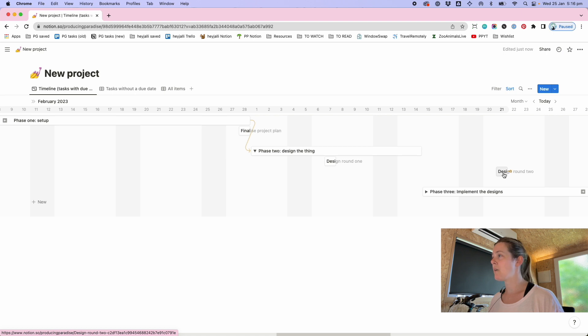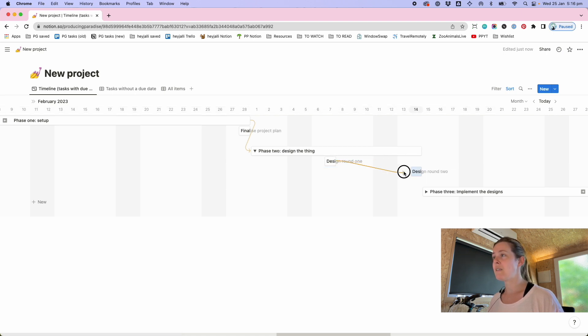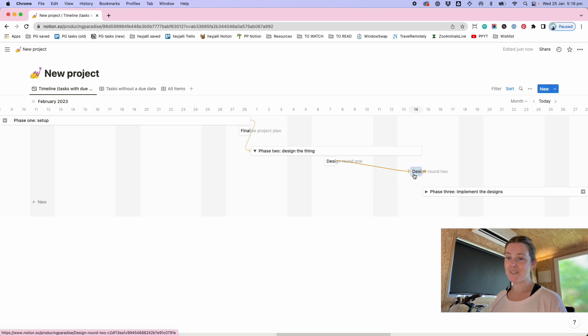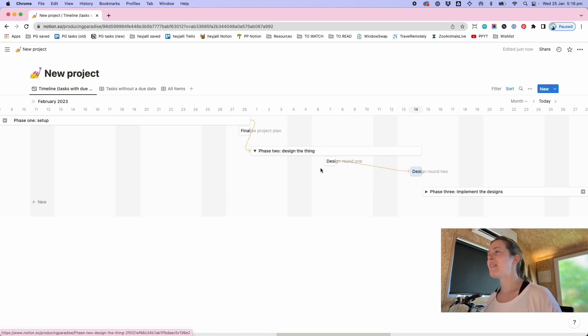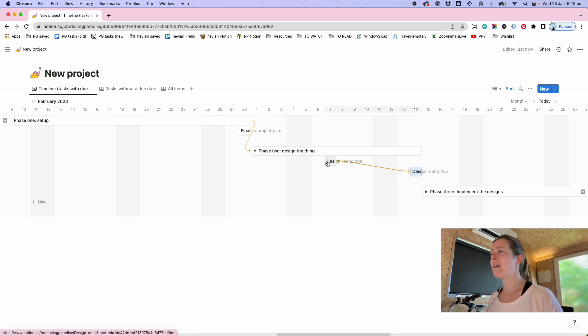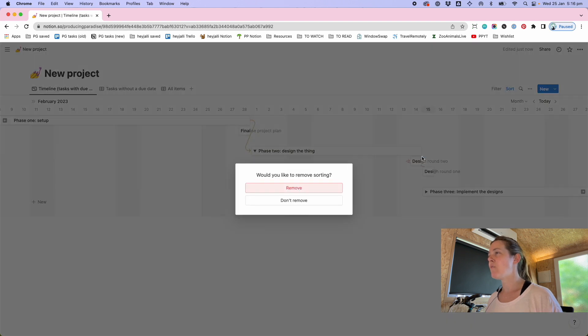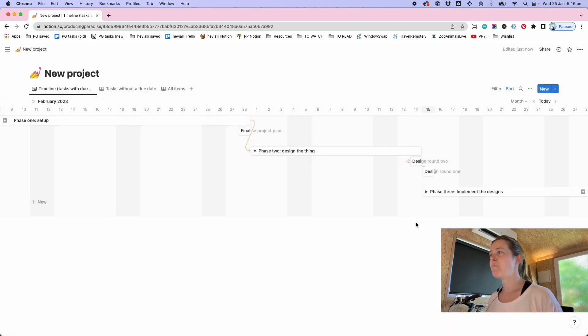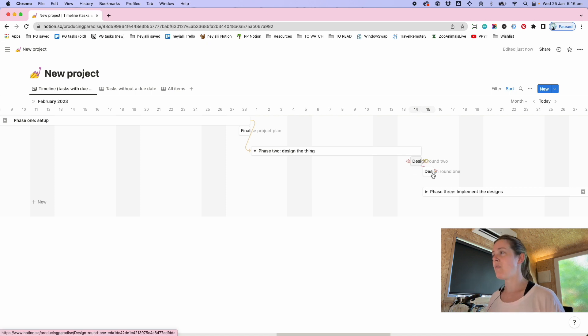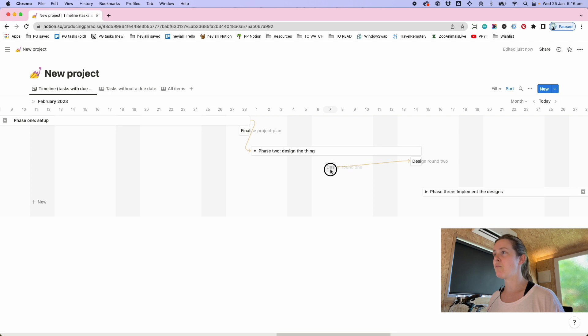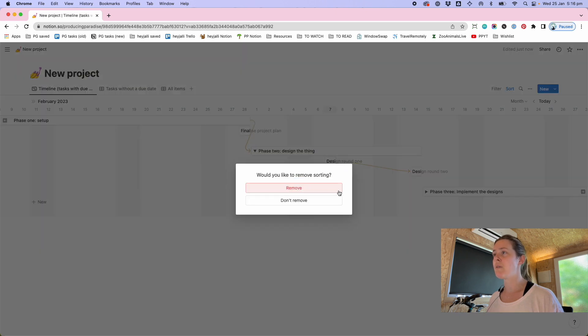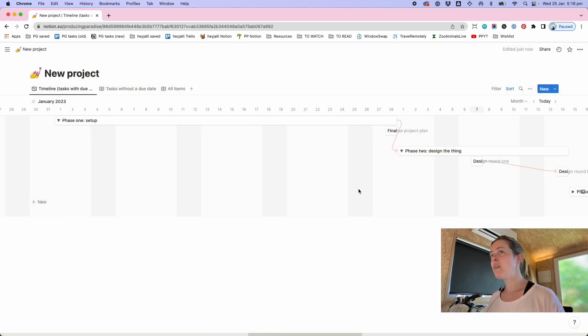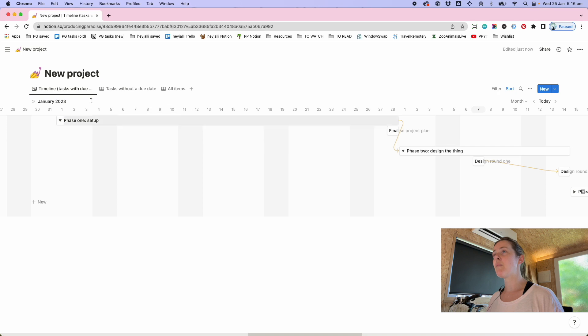So oh I see I've actually done a terrible job here so design round two let's put that at the end of the phase and let's say design round one is dependent sorry design round two dependent on design round one. And it means that then if you try to move your dates around and say oh no we're not going to get design round one done until the 15th you then see this red line appears and kind of starts to show you as you have red lines that the dependency doesn't work it sort of maps that there's a problem to be solved.